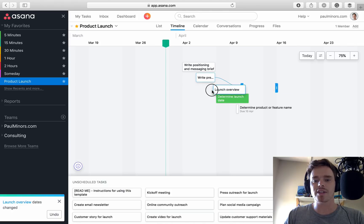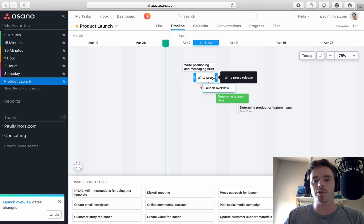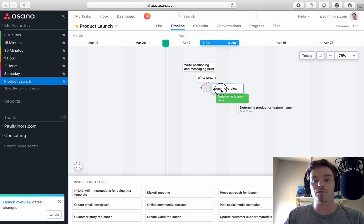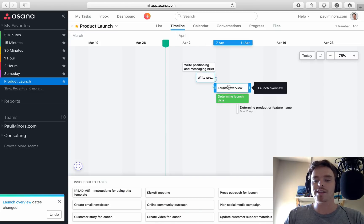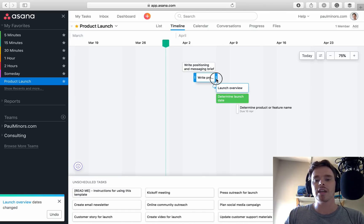What I have noticed is that if you move the start date to before the end date of that, the arrow turns red to kind of show like, hey, this task that's dependent is actually starting before this one's done. So there's an issue. Now something I have noticed is, even if I move this back, it actually does not affect the dependent task.